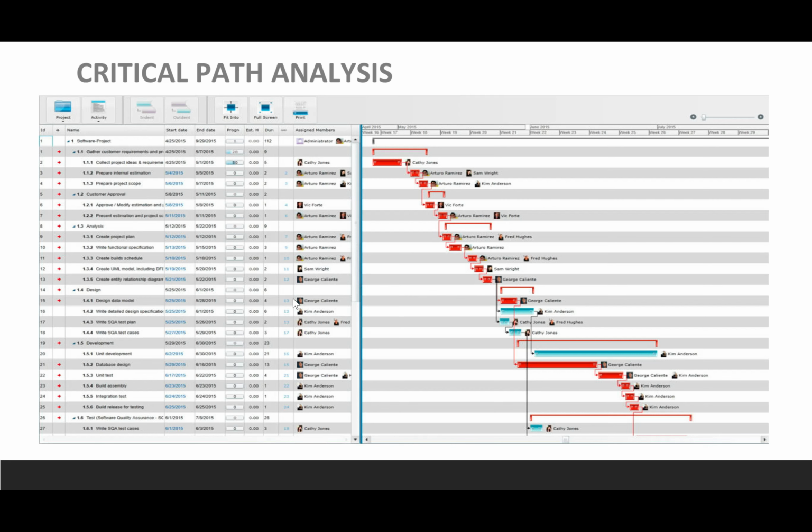Now, fast tracking has a little bit more risk added to it, but you have to work with your team to make a decision on if you want to accept that risk and just move forward. Okay, so that's one of the first things you're going to do: make a copy of your schedule so that you can model different situations on how to bring in your critical path by 4 weeks.